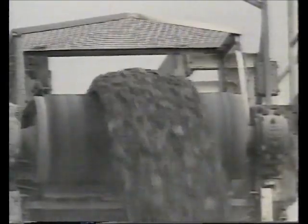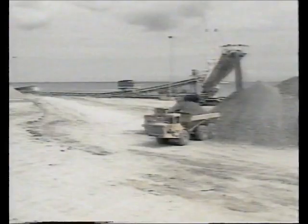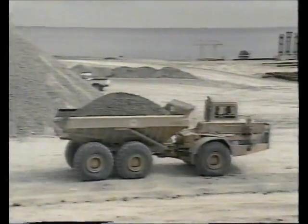The spoil on the conveyor belts was carried up to the construction platform, where it was loaded onto trucks and dumped into lagoons which had been created behind specially built retaining walls. This extended the construction platform at the site and proved the most environmentally sensitive method of disposing of the millions of tons of chalk marl which the TBMs were excavating as they drove the tunnel onwards.